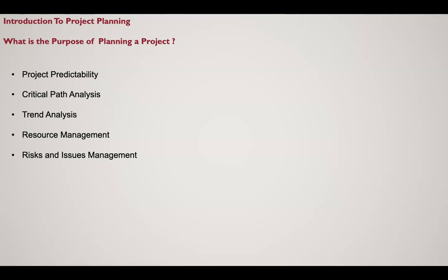Critical path analysis, which we will do later, I'll just mention these. So the critical path is the shortest duration by which a project can finish. Some would define critical path as the longest path, I will tell you what that means, and some would define it as zero or negative float. When we get into the core planning on this course, we will discuss that. But what this is telling you is you should be able to analyze where the dangers are, where the activities are very important and need to get done. If they don't get them done, it will delay the project.